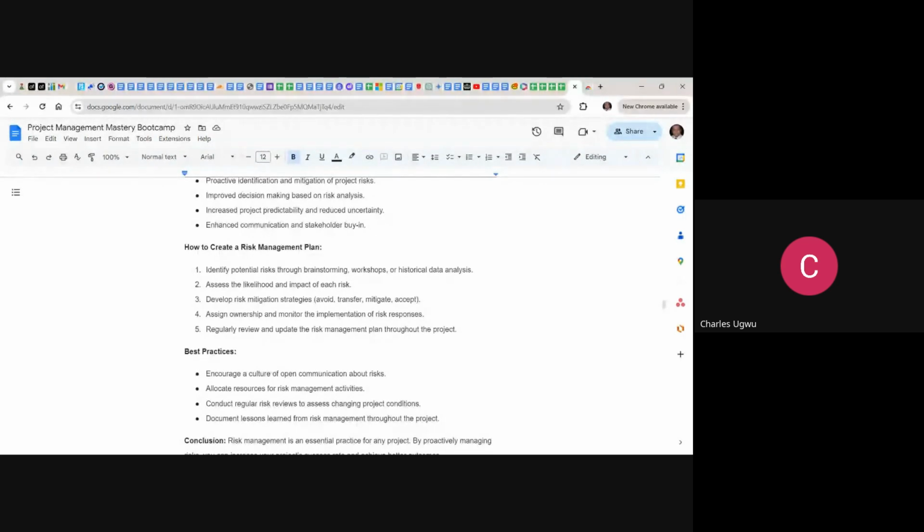So some of these team members must be sought out and asked why they are not being prompt with their deliverables. So these are key areas. If a team member is sick, you must have a strategy to make sure there is a replacement. If a team member is going on vacation or holiday, you must know ahead of time and make arrangements for a replacement. If a team member is going on annual or maternity leave, the same applies.